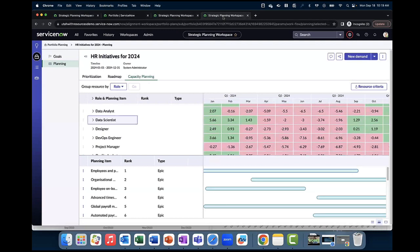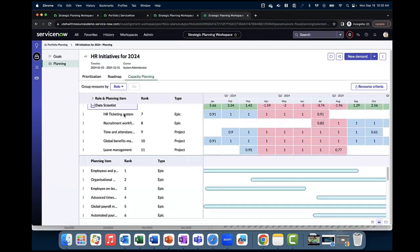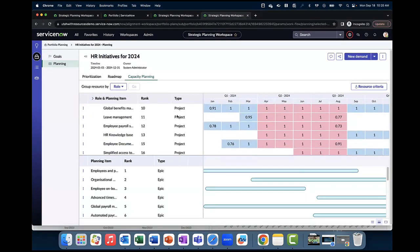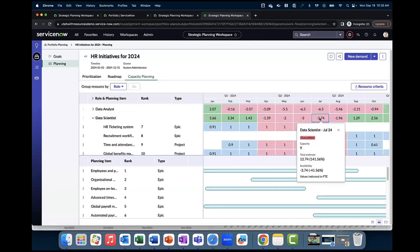Now if we click on a resource — let's say I'm going to pick the data scientist role — and if I click on the dropdown arrow next to this resource, I can see all of the planning items that have been assigned to this particular role, including the type of work items that they are. Clicking into a particular month corresponding to that role will provide more details as to why this data scientist role has been overutilized in the month of July, for example.